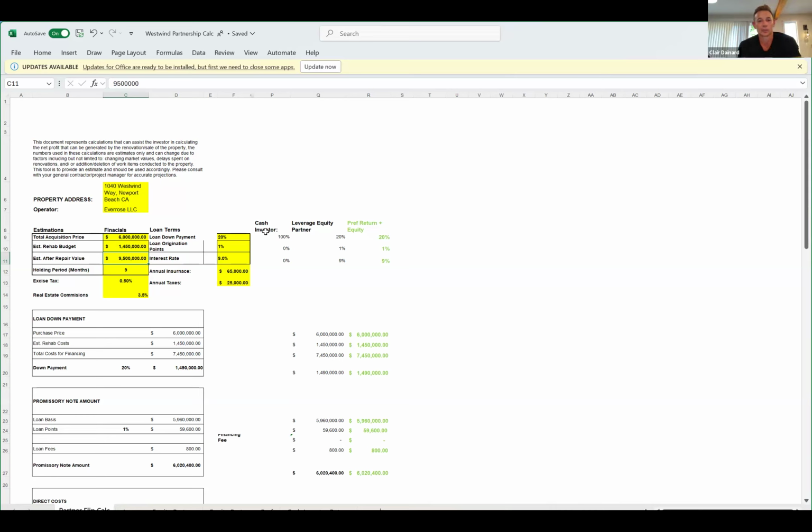What I found is my original budget on this property, I thought, would be 1.35 to 1.4 with the contractor that I had. Now, because it was last minute, I had to get 3 other quotes, and those quotes were ranging anywhere between $325 and $400 a foot to take it to the level that we want. So as I was getting these construction bids, at $350 a foot, it was going to put me at 1.505, right?